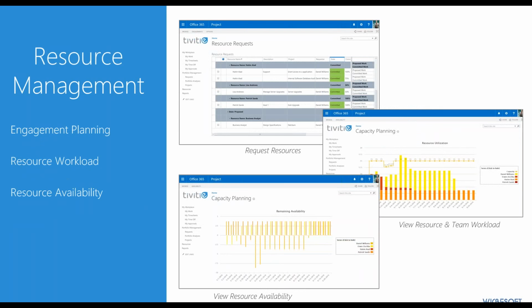We also have the opportunity when we do this to have more holistic resource capacity planning. So instead of having silos of information where you just have a subset of resource demand in your, say, traditional PPM and waterfall solution, and another one in your agile solution, and even another one in your service management solution, being able to bring that data together so you have a holistic view of all work. And all of that may not be project management type of work. There may be other things pulling from the capacity of our people that basically limit our ability to actually deliver project work.